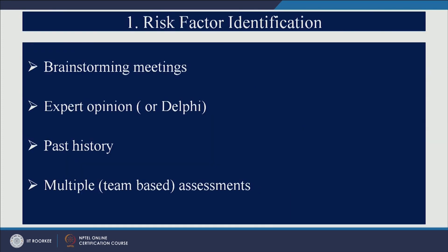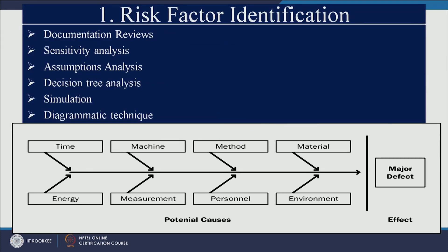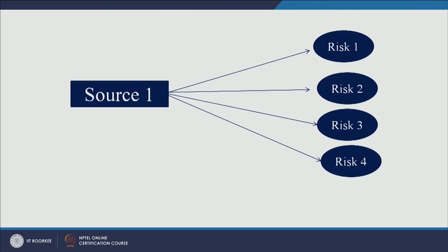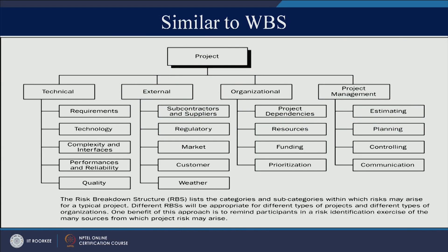How to identify risk is a most important point. You can go for brainstorming sessions, expert opinion, the Delphi method, or on the basis of past data to identify different types of risks. You can also have several sources for one risk, and one source for several risks. Risks can be identified by reviewing previous documents, sensitivity analysis, assumption analysis, decision tree analysis, simulation, and diagrammatic techniques. You should also come up with a risk breakdown structure, similar to a work breakdown structure.